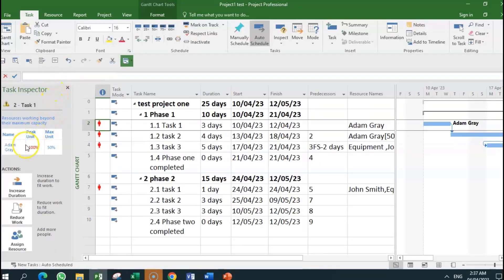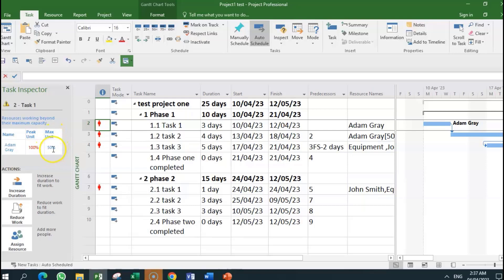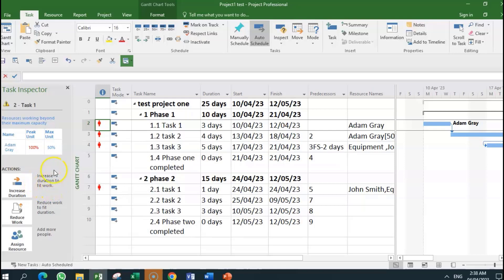Now the task inspector is telling us the issue may be that this person has 50% maximum allocation for this project, and apparently is required to do 100%. So some of the actions being recommended: increase duration to fit work so that if you can only work 50%, we extend the duration, we extend the duration so that he would work 50% over a longer period and that would reduce the over-allocation.